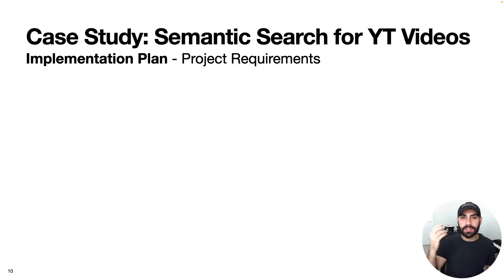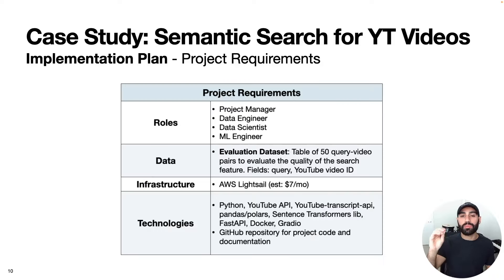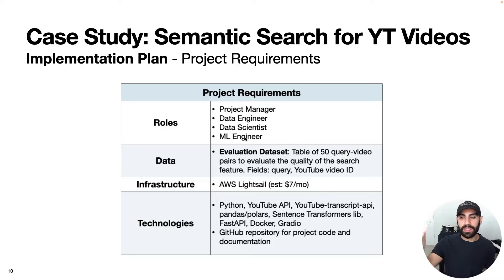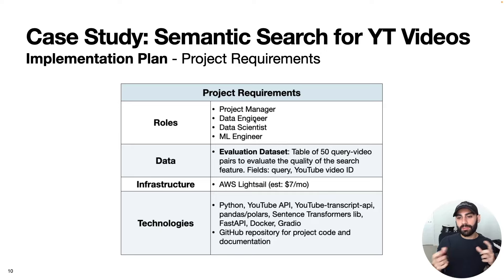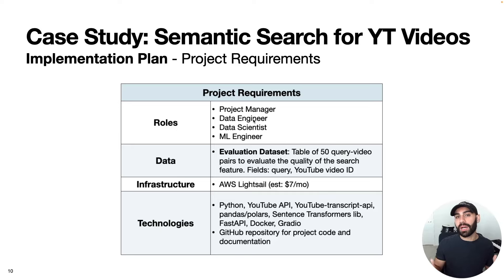That brings us to the implementation plan, the first part of which are the project requirements: the roles, the data, the compute infrastructure, and the technologies needed. The roles listed are the four hats of the full-stack data scientist: project manager, data engineer, data scientist, and ML engineer. Importantly, roles do not equal people — multiple people can do multiple roles, and a single role can be done by multiple people. Even as a full-stack data scientist, you might still want to bring in a data engineer or data scientist to help.